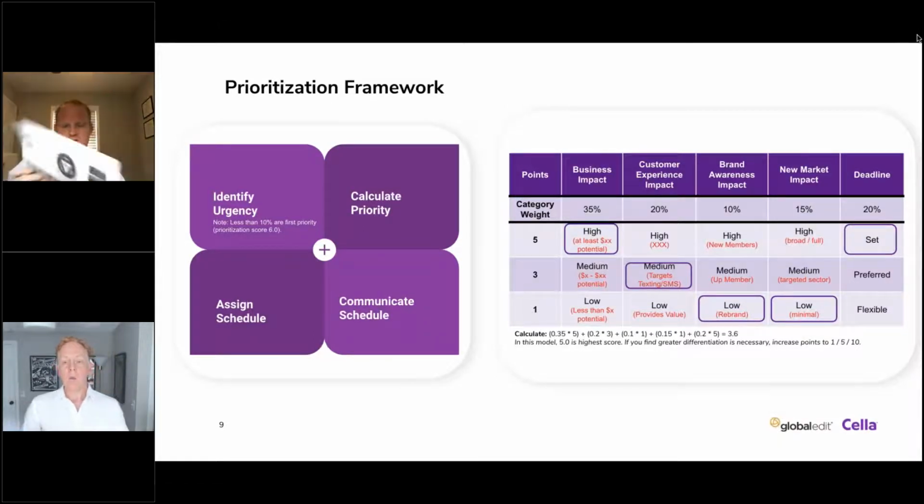And when you actually approach your work with a classification system, that ensures that projects receive the appropriate level of effort that they require. You're assigning the appropriate level of creative direction, senior leadership reviews, in-person client presentation, and that enables the team to allocate adequate resources to certain projects and then fast track other projects.